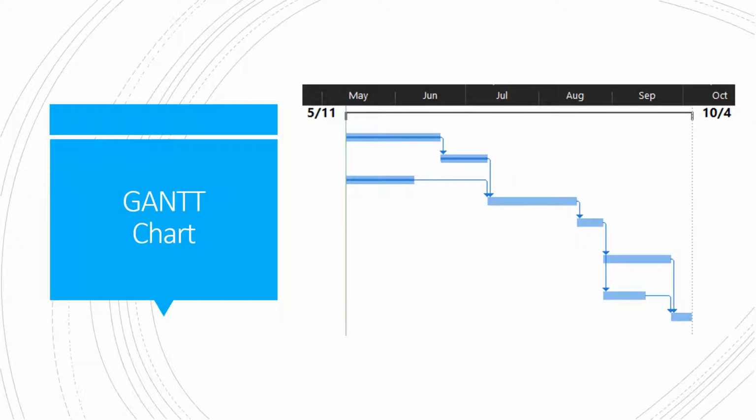So here's a view of the Gantt chart for this project. Thankfully, Microsoft Project automatically works up this Gantt chart while you're inputting tasks, and there's not a whole lot of work that goes into developing it. It just kind of shows up. But there are some modifications you can make to make the Gantt chart look the way that you want it to. If you look at the first 3 tasks, which are technically completed, it might be hard to see, but there is a defining darker blue line in the middle of those, and those show up because we set the tasks earlier to be complete when we added those check marks, which in return adds these defining lines to the tasks that are already completed, which just helps give a visual of the progress of the project.